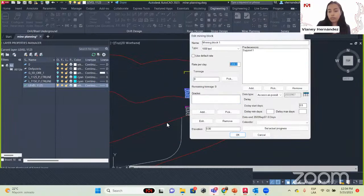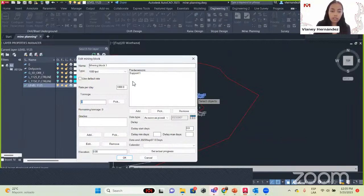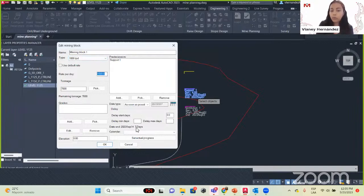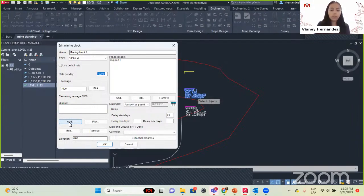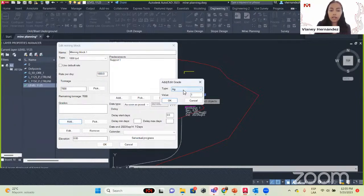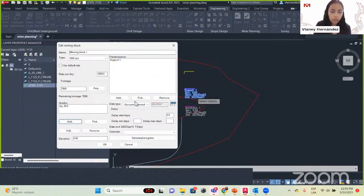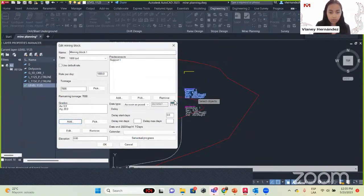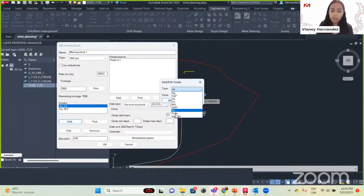We can pick the tonnage — in that part of our mining block we will have 7000 tonnes. The rate is 1000 per day, so we will be done in 7 days. For grades, click Add and set silver at 20 grams per tonne, then gold at 5 grams per tonne. You can set the elevation of our block — for example 1125 to match the section elevation. Select the predecessor, select 'as soon as possible' or a specific date, and click OK. Here we have our mining block.